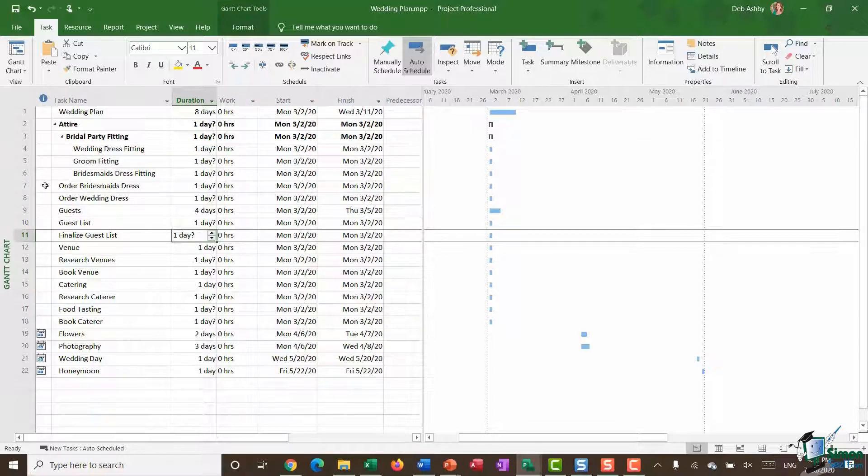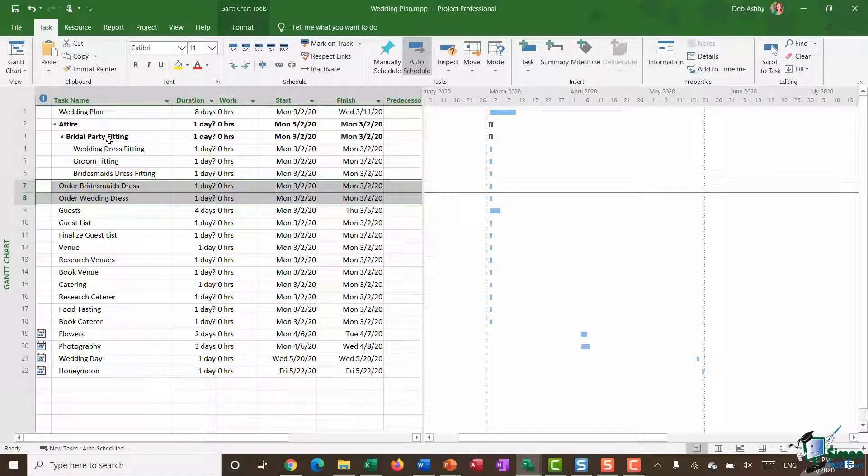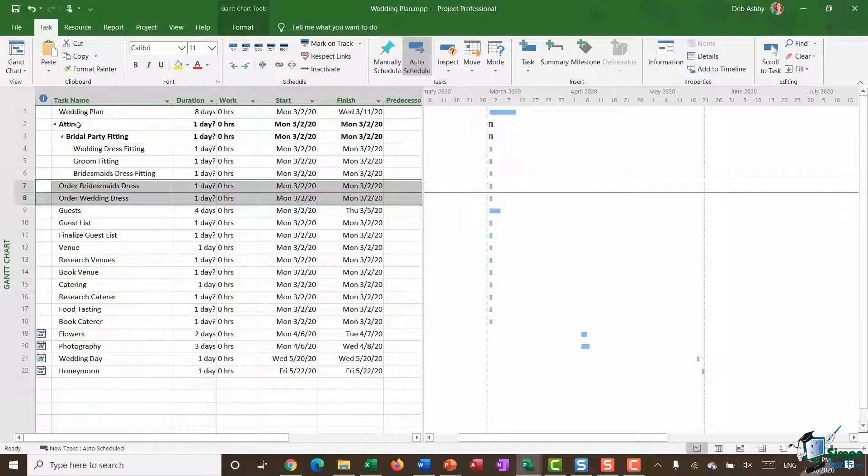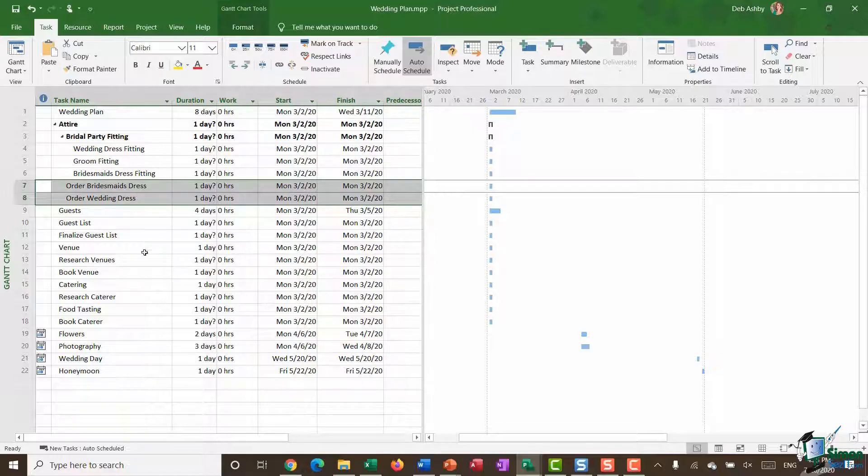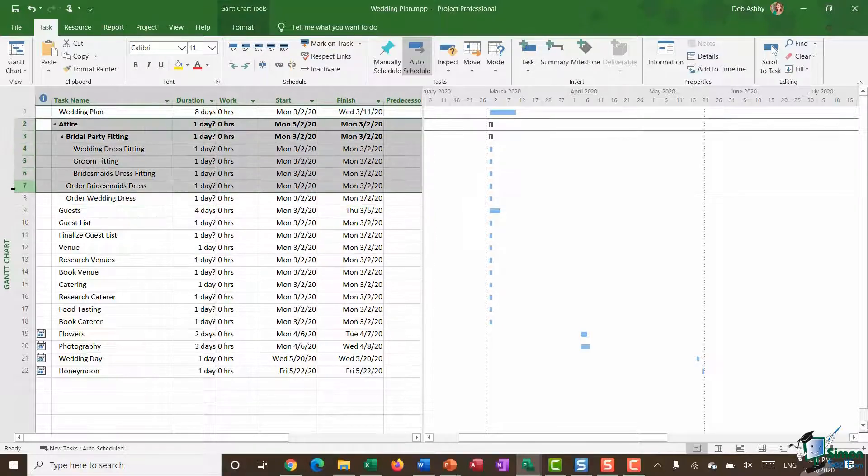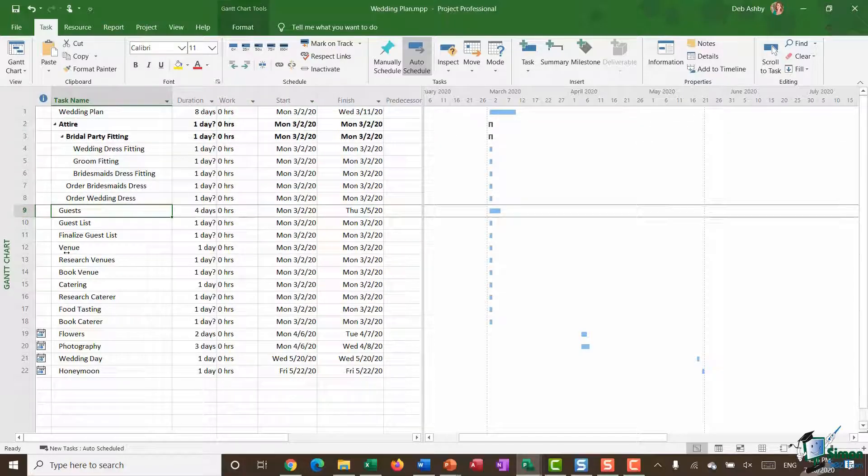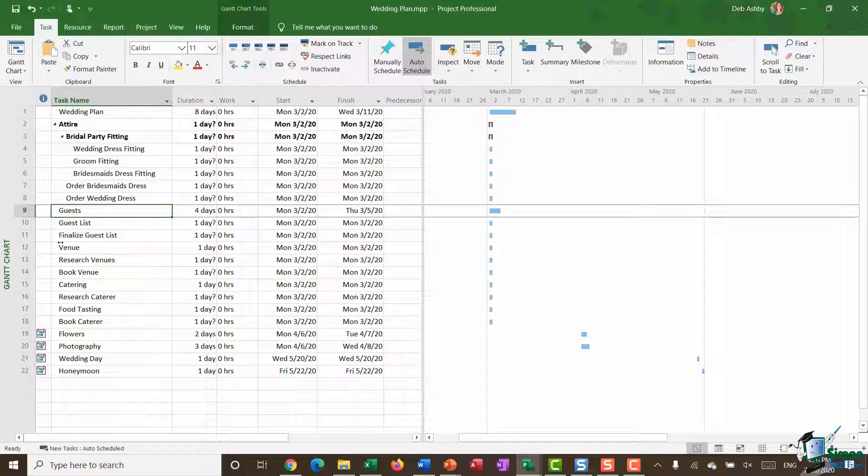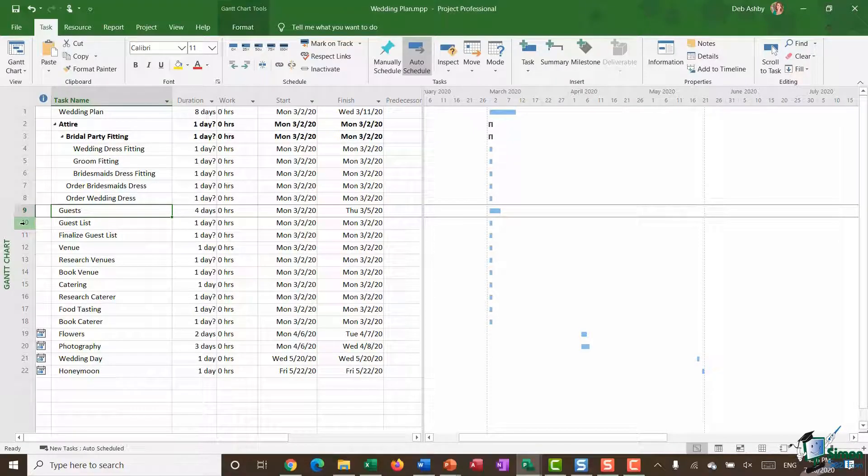And then what I'm also going to do here is for order bridesmaid's dress and order wedding dress, these don't need to come under bridal party fitting but they do still come under the attire heading so I want to make these two subtasks. So let's click indent just once. I've added a nice structure to this first part of my project plan and what I would essentially do is go through the rest of my project adding this structure.